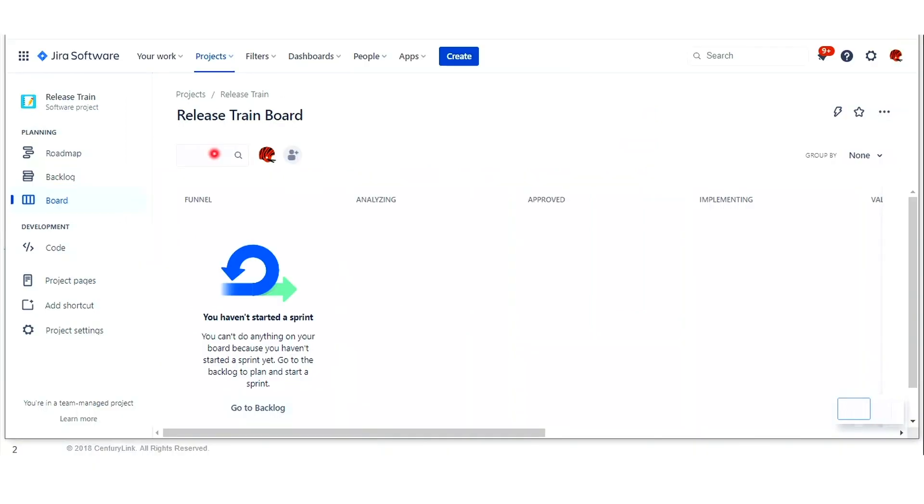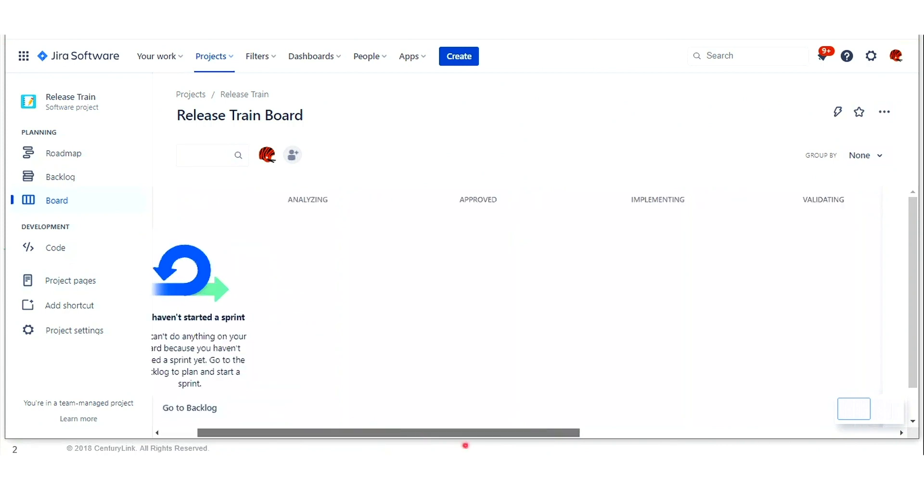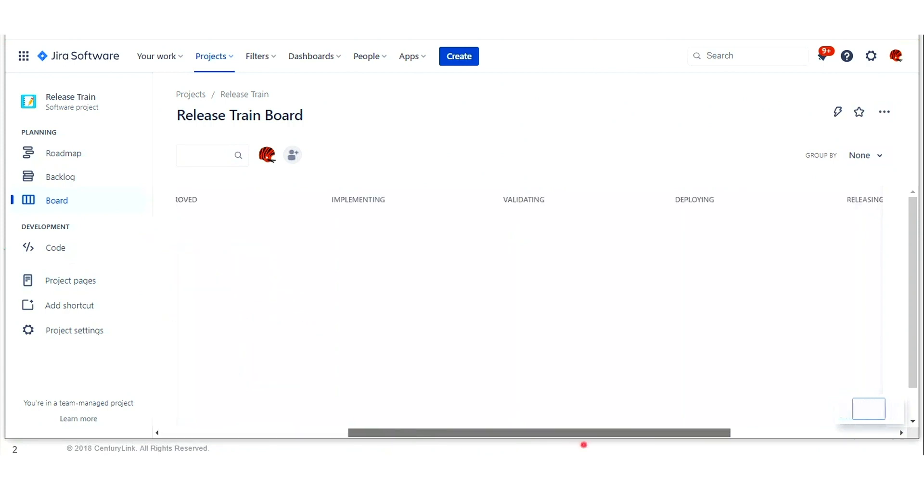Our agile release train board has a similar workflow to the capability. As you can see, it moves from the left to right, the funnel, analyzing, approved, implementing, validating, deploying, releasing, and done.